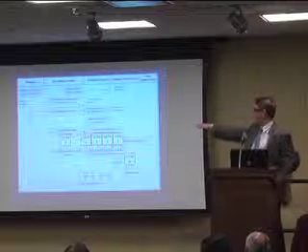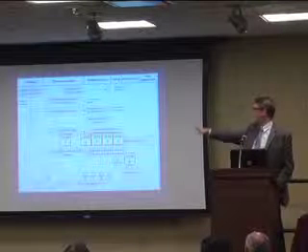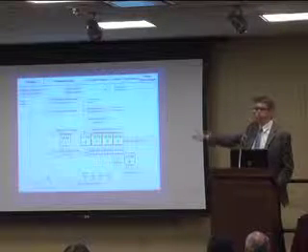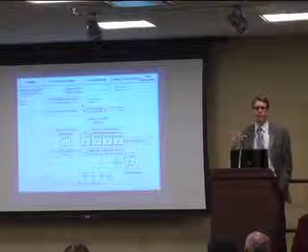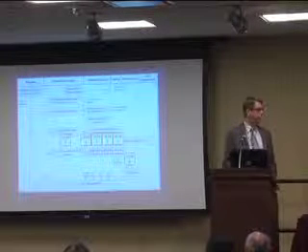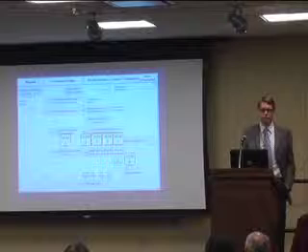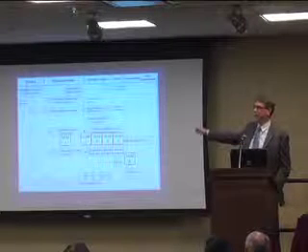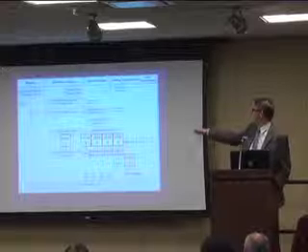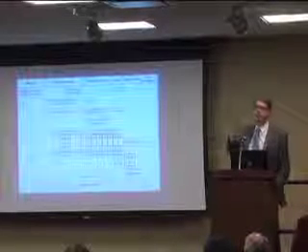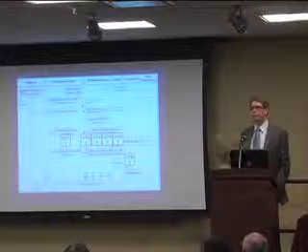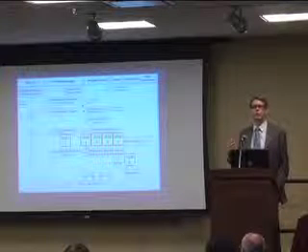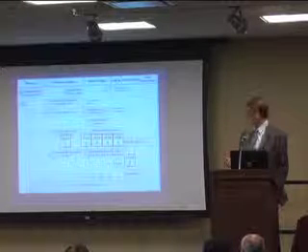Typically, that point in time is somewhere in the preliminary design phase, whenever you get information to start moving forward and managing your utility conflicts. If you start at the design conference, which would be the start of the detailed design phase, then you're already behind the curve, and you're missing a lot of opportunity to deal with the utility conflicts early.